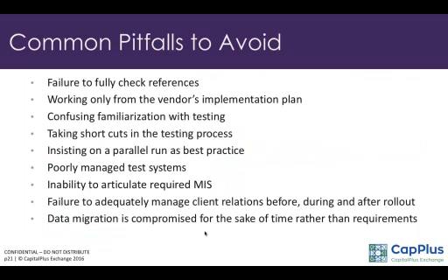You could check references like that, and most of the questions that you want answered will be answered, especially in the evening, if you meet them for a coffee. That has been my experience. Ensure that the vendor doesn't come for any of the reference site visits. They should only introduce you to the client, because the client will never talk bad. They'll talk about the good, they'll never talk about the issues or the risks or challenges that they face if the vendor is present. So ensure that that's done.